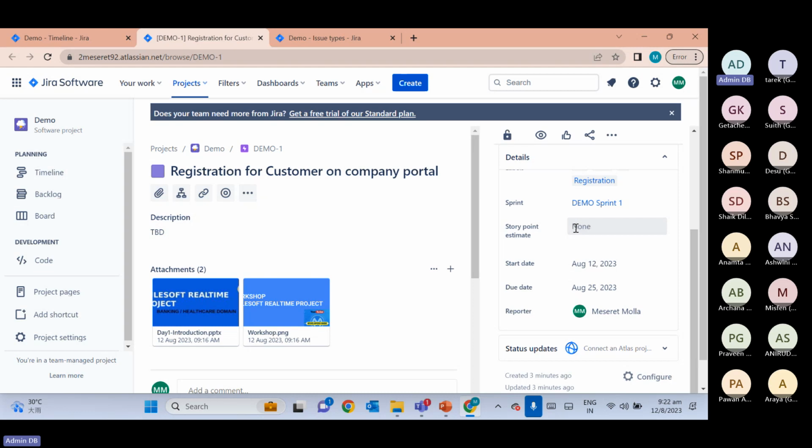I don't have any option. The actual meaning of story point is complexity of the task, nowhere is it related to number of man days. That is the key fact, but organizations don't take it the same way, so you need to be a bit customized on this part.